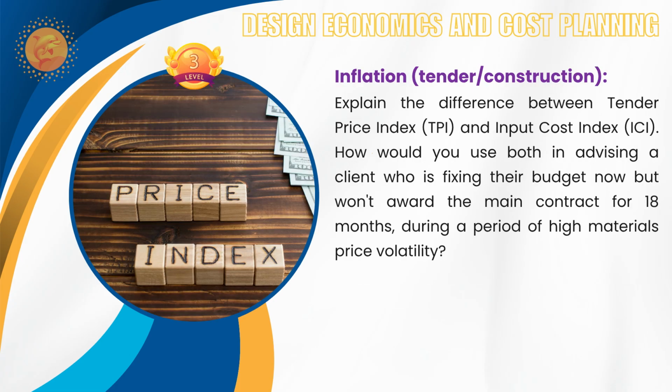Inflation. As I mentioned previously, here is how inflation is applicable for tender or construction. Explain the difference between tender price index and input cost index. These two are different. As I said, cost is for your material, labor, those kinds of things, direct and indirect cost. But tender price index is the tendency to price by the tenderers.